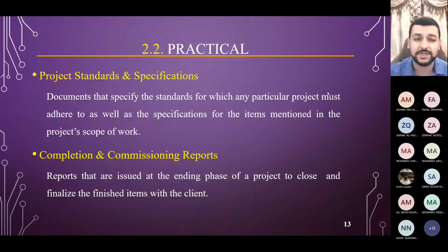Then we have the completion and commissioning report. Congratulations, you have finished your construction building, you have finished your factory, you have finished your facility. Then what? How will the client know that it's done? You'll have to physically test it. You'll have to, for example, open the AC for the house to know if it's actually cooling or not, if the piping is well made or not.